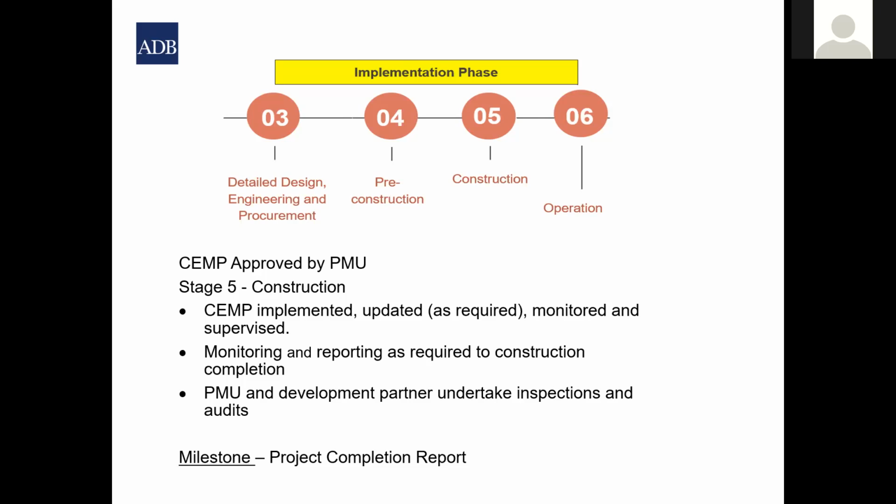Do you understand what I'm saying? So you can give provisional approval of a CEMP for site clearance, for dredging. And then with the condition that before he starts the next activity, which may be removal of piles or something else, we need to have that site-specific plan approved before that activity begins. So just keep that in mind in terms of approval of the CEMP.